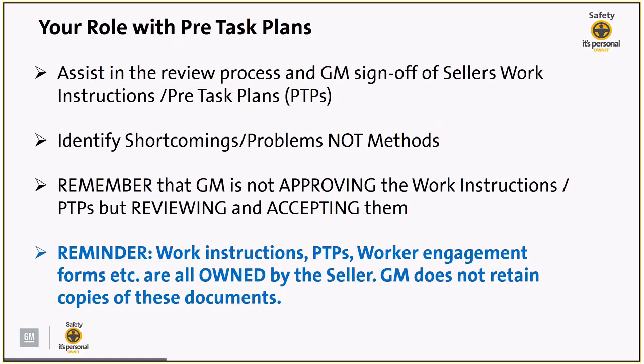So what is your role once again for pre-task plans? You are to assist in the review process and sign off on a seller's work instructions or pre-task plans. You are to identify shortcomings and problems. Remember that GM is not approving the work instructions or pre-task plans, but we are reviewing and accepting them.